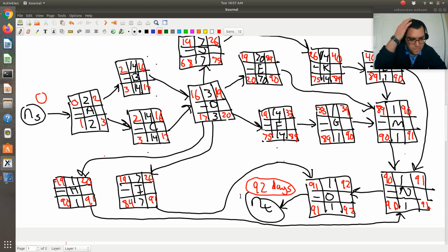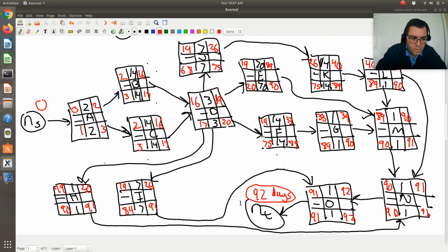And so then, yeah, that's where I... shoot. So you see me making this mistake. Okay, so that's 90. Has to begin at 90. That's 91. Okay, so then N's dependent on H. So if I start with H, this needs to be 90, and that has a duration of 1, so that's 89. Okay, bam. So then I have H.